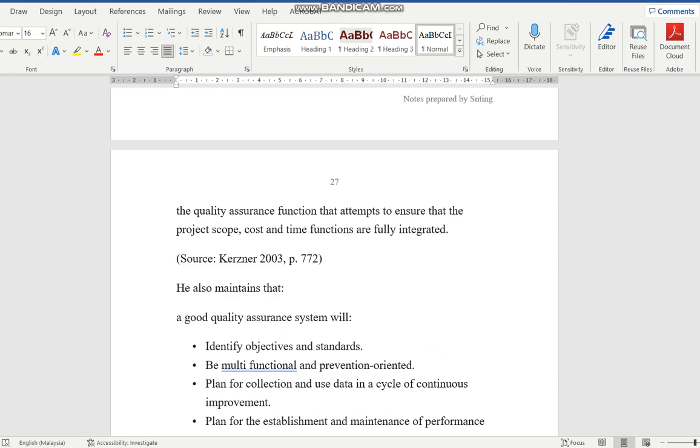If you start off doing a proper quality assurance system for your project, you list down what the activities and objectives are, and also what the desired level of quality or level of excellence is. And then for these activities, you do your work method statement. From your work method statement, you also put down the essential critical steps that must be there, that cannot be skipped. And from there, you don't really split it down into very, very small parts. Some of the major parts need to be checked, then you check.